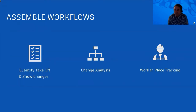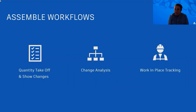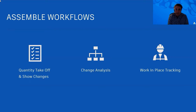A key workflow is work-in-place tracking. Once you've completed the costing element of the 3D model, you can move to the mobile app and report on progress. Adding data fields such as installation status, planned start date, and planned finish date — and even pulling schedule data from Primavera P6 via our schedule integration — gives you a four-dimensional view of cost versus progress, and even a five-dimensional view when reported in Power BI.